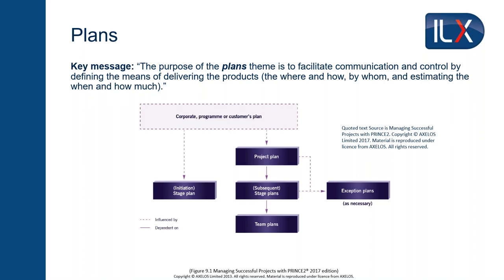There's one more plan: the exception plan, which is a replacement if things don't go to plan. Used particularly at stage and project level, if things go awry — if we can't follow the current plan because we're so far off track — the exception plan covers how to get from the problem back on track. Importantly, your projects don't have to go wrong, but if they do, exception plans are there to get them back on track.